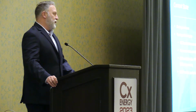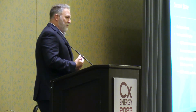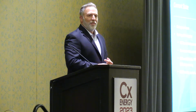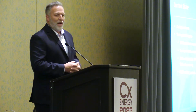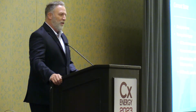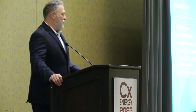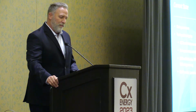Same would come true with the sequence of operations, right? We sometimes as owners are our worst enemy, right? We don't always follow the same SOO that we ask everybody to develop for us. As soon as we get that system operating as it should, we change the parameters. We put things in manual operation, we change logic, we update the graphics so that it doesn't look like what it was when our CXA commissioned it. So we have to properly train our facility staff as to how these technologically advanced systems operate.